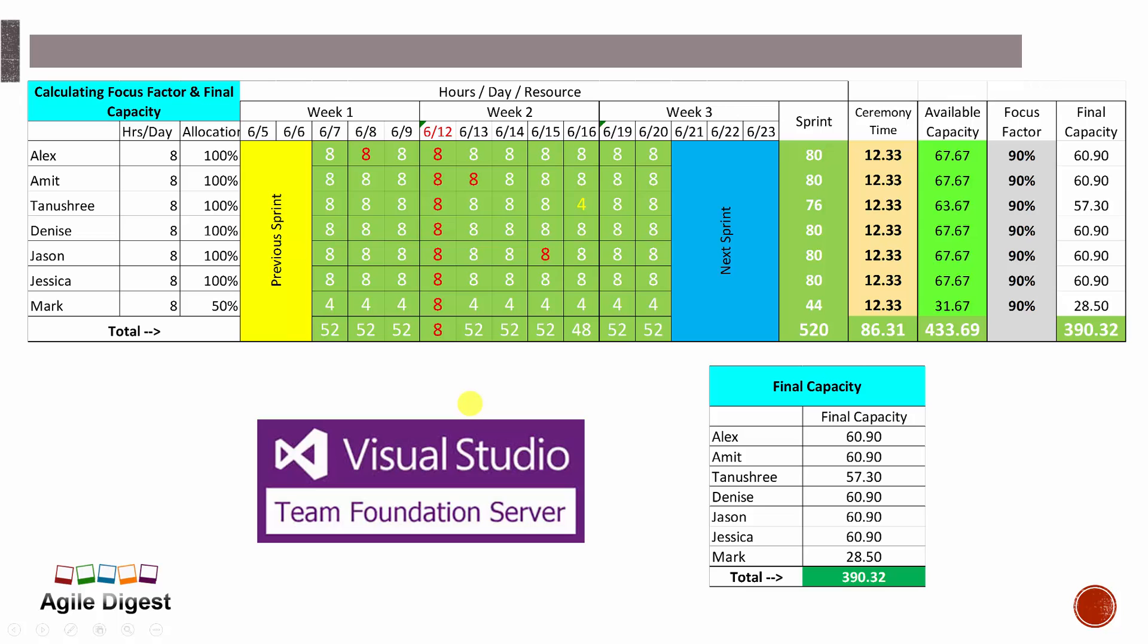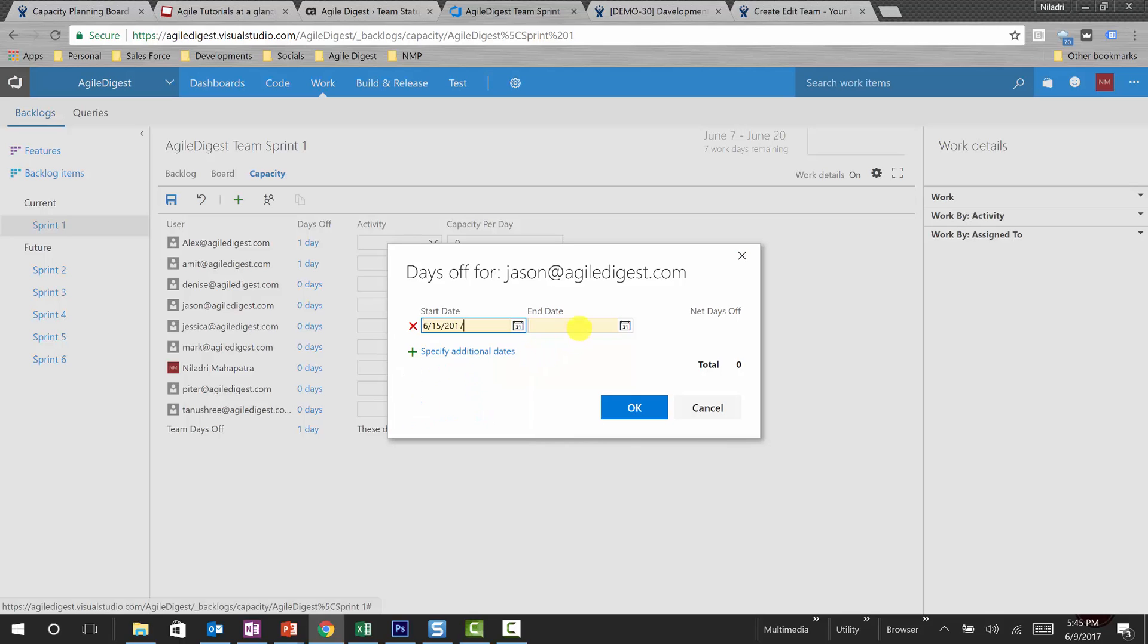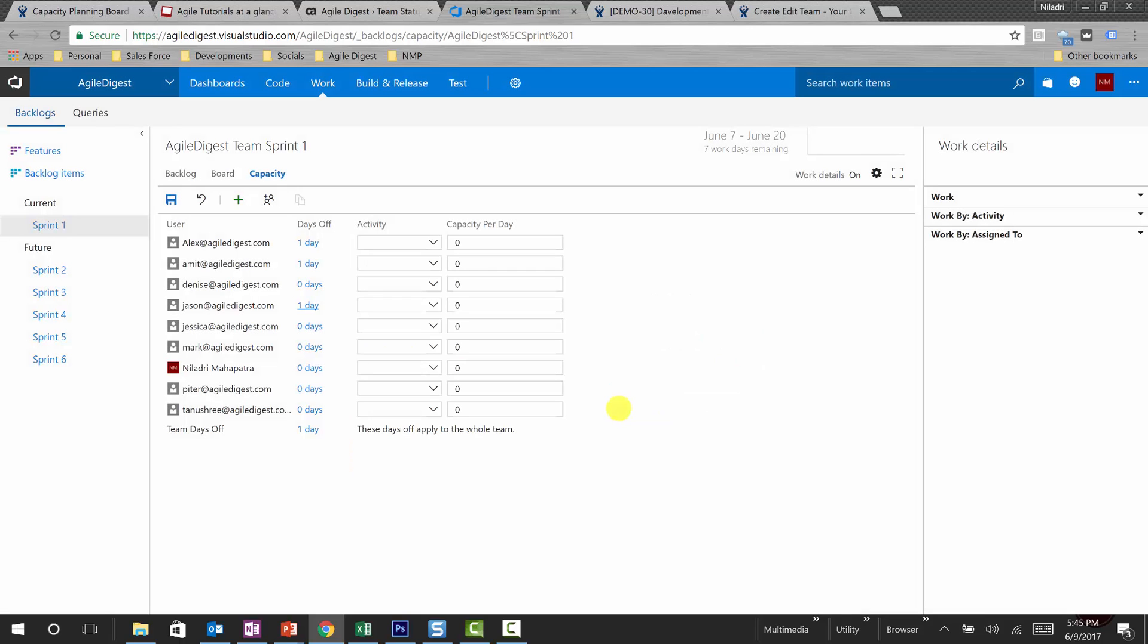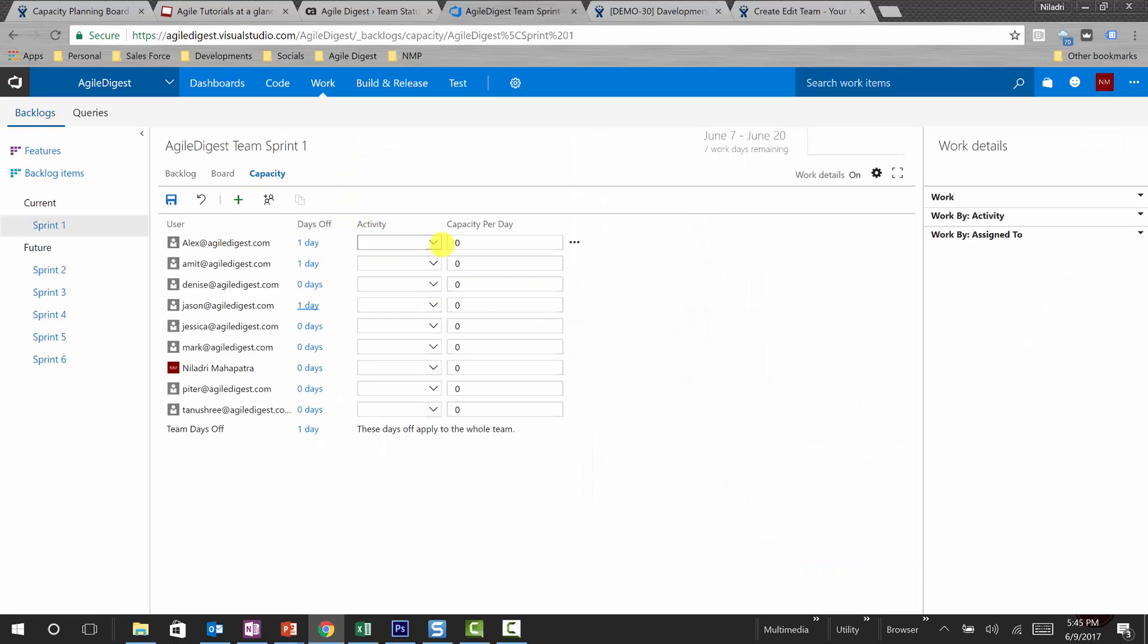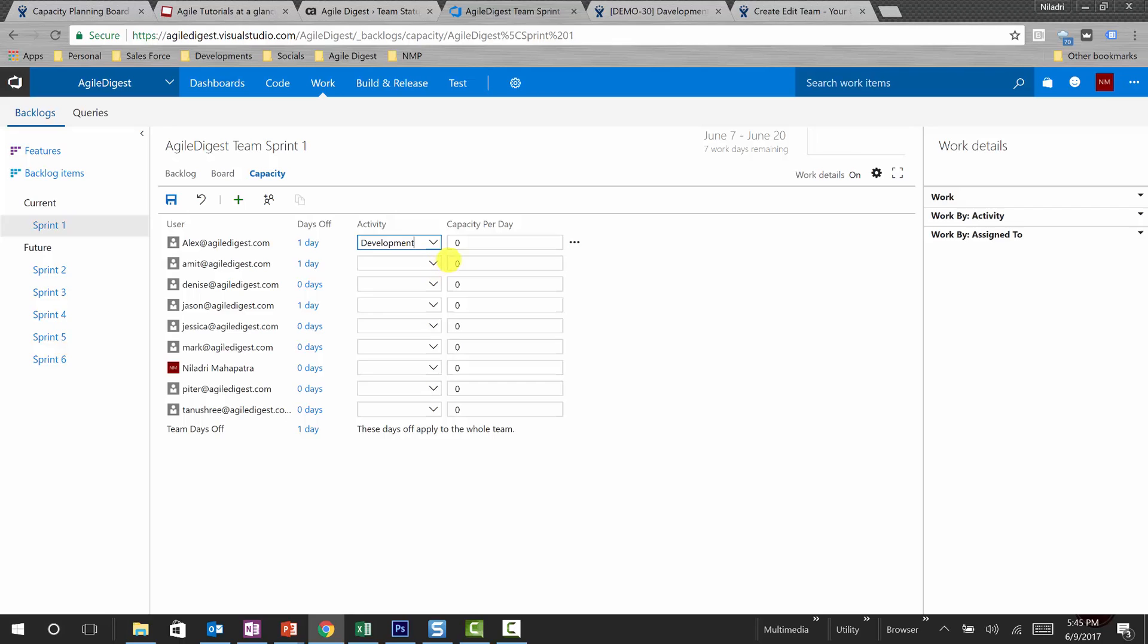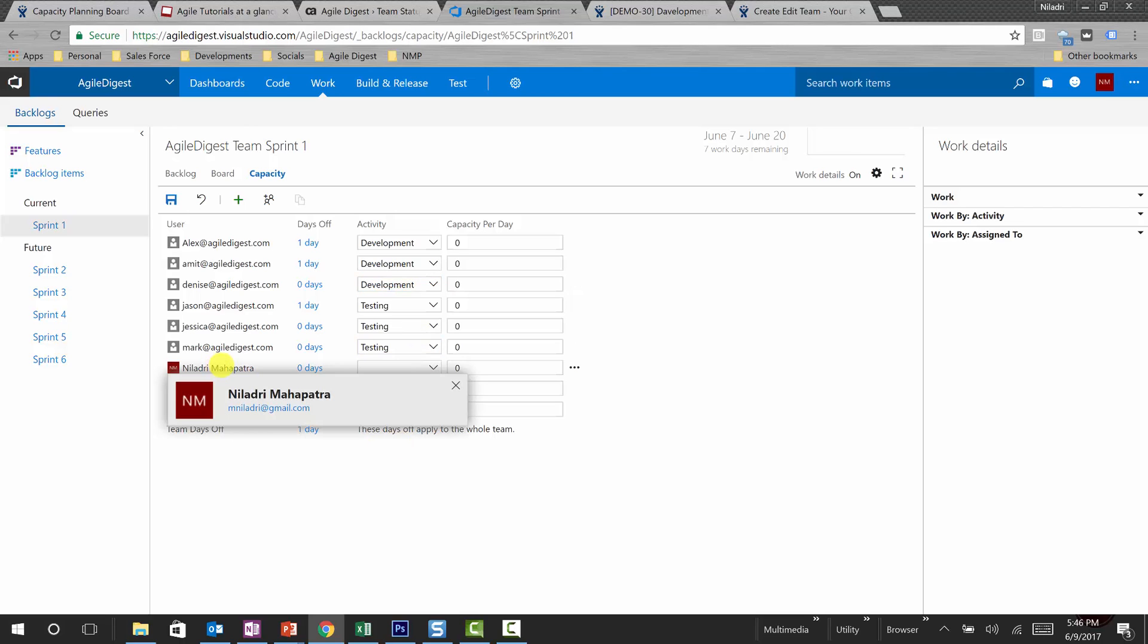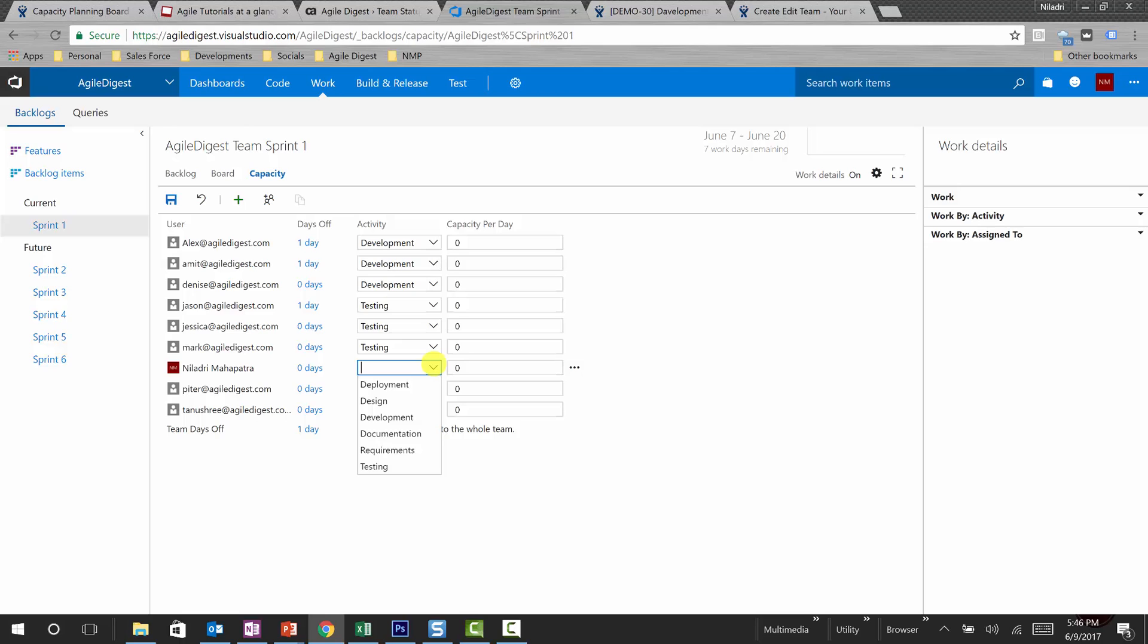This is what we have done. Now we'll be looking into the role also. We know Alex was a developer, he will be doing the activity of development. Amit will do the activity of development. Here we are assuming Niladri is the product owner and Peter is the scrum master, so we'll not put any allocation for them as a capacity because they will not take part in the construction.